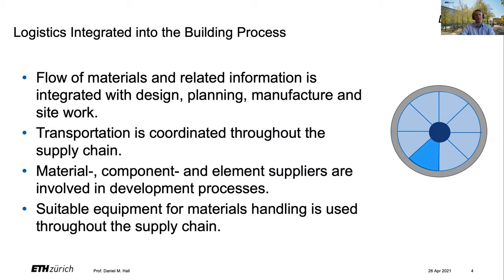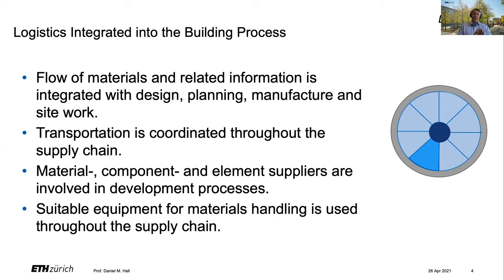Also, with industrialized construction, the second point becomes quite important. We have to think about transportation and how we coordinate that throughout the supply chain. You also have to think about transportation if you're not doing off-site modular prefabricated elements, but those are typically handled by the suppliers themselves. With industrialized construction, this often shifts into the scope of work of the prefabrication company rather than the individual suppliers.